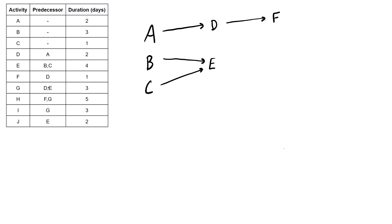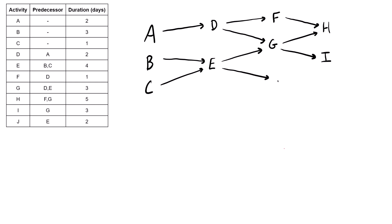Activity G depends on D and E, so we have an arrow coming from D and an arrow coming from E. Activity H depends on F and G, so F and G both lead into H — we draw an arrow coming out of each going to activity H. Activity I depends only on G, so we draw a single arrow out to activity I. Activity J is the final one; it depends only on activity E, so we draw it for activity J.